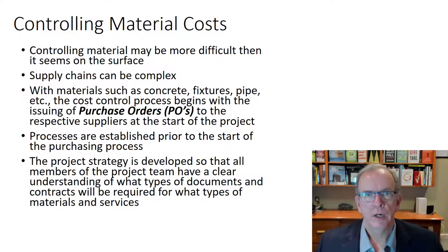is for. So then basically you'd want to be assigning those costs to your project, and you want to be looking at the amounts that are coming off of those particular items. What areas of work are they being used for? So that you can track your costs and compare it to what your budget was. So we really develop these processes with our suppliers prior to the start of the purchasing process, right?